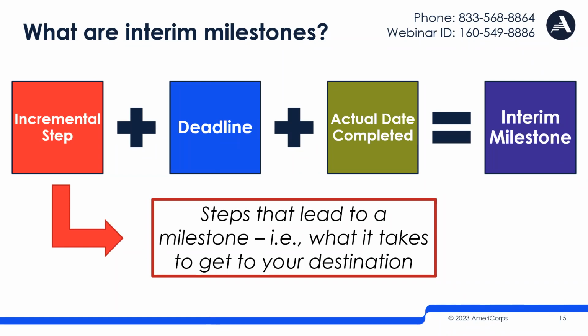So in order to get into a work plan and get into the level of usefulness, again, awesomeness that I think is so great about it, this is where the heavy lifting comes in. It's slicing up those big goals, those big activities, those big project milestones into these incremental steps that will all lead you back, right? Lead you back to your ultimate goal, your ultimate destination.